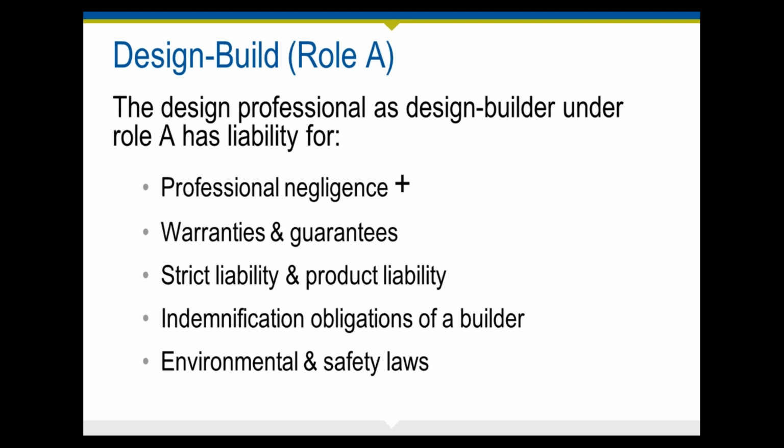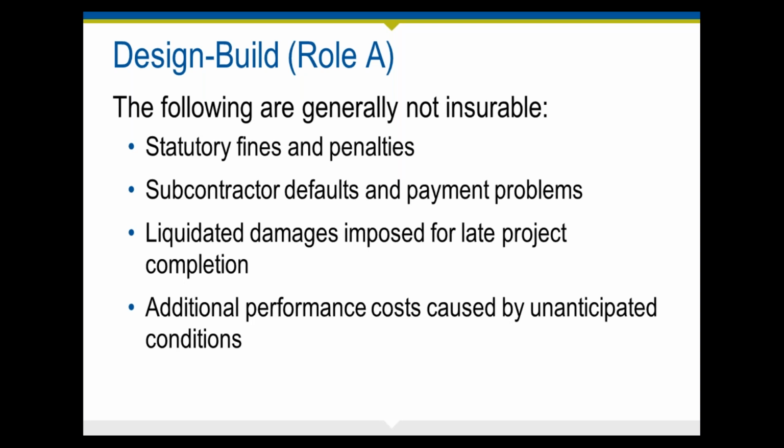And depending on the state, remember that you may need to be licensed as a contractor to have these types of responsibilities. So the following are generally not insurable, right? Statutory fines and penalties that you may be subjected to, business risks such as subcontractor defaults and payment problems, liquidated damages.